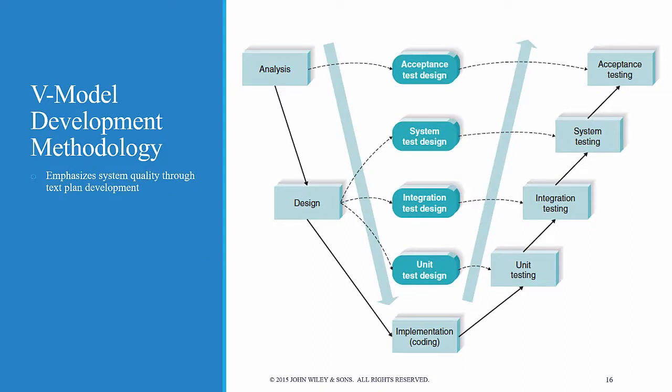A third variant is the so-called V-model development methodology, which puts heavy emphasis on testing and in this way promotes system quality through test plan development. In this visual, the development process proceeds down the left-hand slope of the so-called V, defining requirements and designing system components. At the base of the V, the code is written, and then on the upward-sloping right side of the model, testing of components, integration testing, and finally acceptance testing are performed.